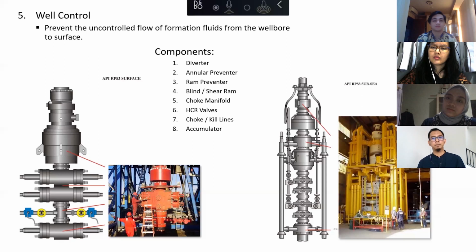Okay, how many wells? We're going to drill 15 wells in 3 years from now. So those 15 wells will have to be invested against the 10 million capital sales, where the Blue Whale will have to purchase from Weatherford capital, right? So they will have to calculate everything: all the depreciation, all the costs associated with maintaining the capital over the next 3 years, and then translate that number into the price that they will submit to Santos. Santos already understands that the price will be higher compared to the price without MPD.